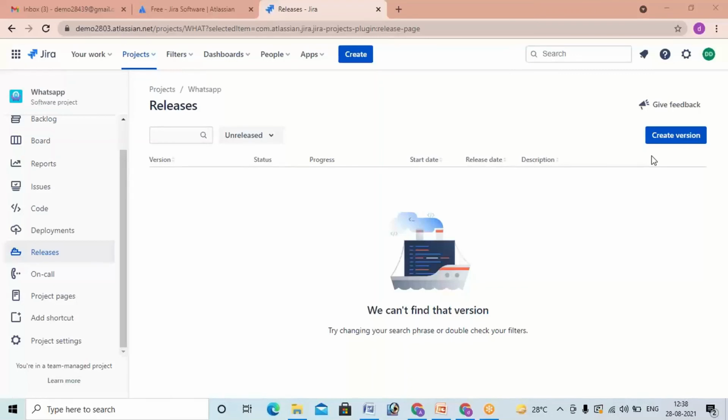And velocity means we give a commitment that when we end this sprint, we have to achieve all those features. That comes under the velocity. As I have told you, the sum of all user story points equals velocity. So in our WhatsApp project, our velocity is 51. So we were giving a 51 commitment, which means by hook or crook, we have to complete all those features in this sprint itself. Got it, Sony?